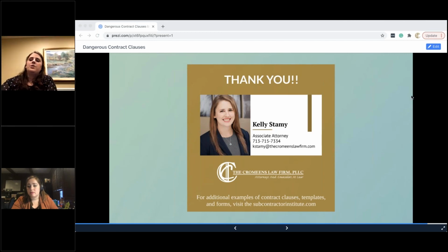That's a good question. So the type of policy is usually just commercial general liability. That's pretty much the type of policy that's going to be in effect. What would want to be looked at and really negotiated, like we kind of talked about, is what are the exclusions? Does one company maybe exclude something that another one doesn't? Does it include defective work? Does it not include defective work?